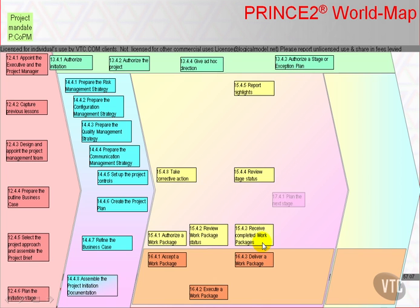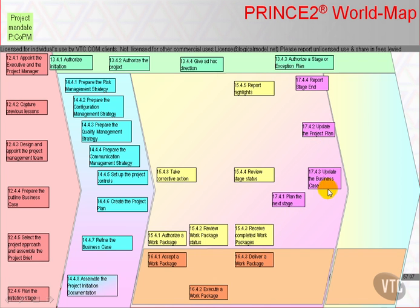Eventually, the cycle of the stage results in plan the next stage, update the Project Plan and the business case — these three activities are probably concurrent and iterative — and then report stage end.